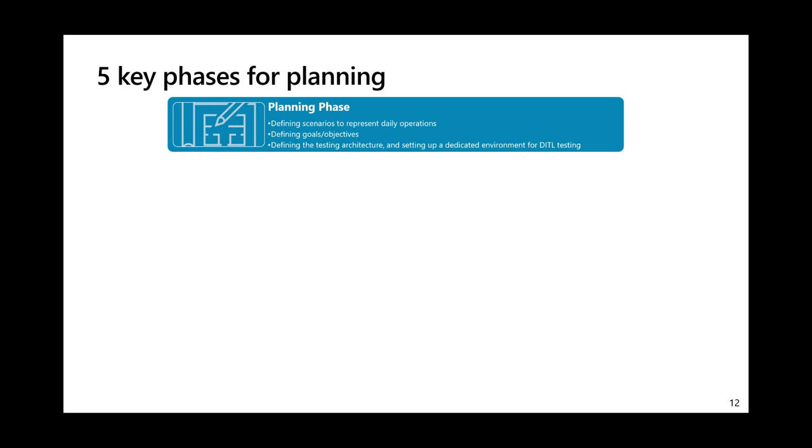And then we need to define the testing architecture. After you have the discussion with the team, you should understand what day in the live operation you need to simulate in the day in the live testing. And then you should start to think about the testing architecture and approach from the testing perspective, what tools you should use, and any help from the customer. Maybe you need the customer to provide the data pattern in the transactional data, or maybe the integration testing endpoint setup. So you should think about the final testing architecture for the live testing.